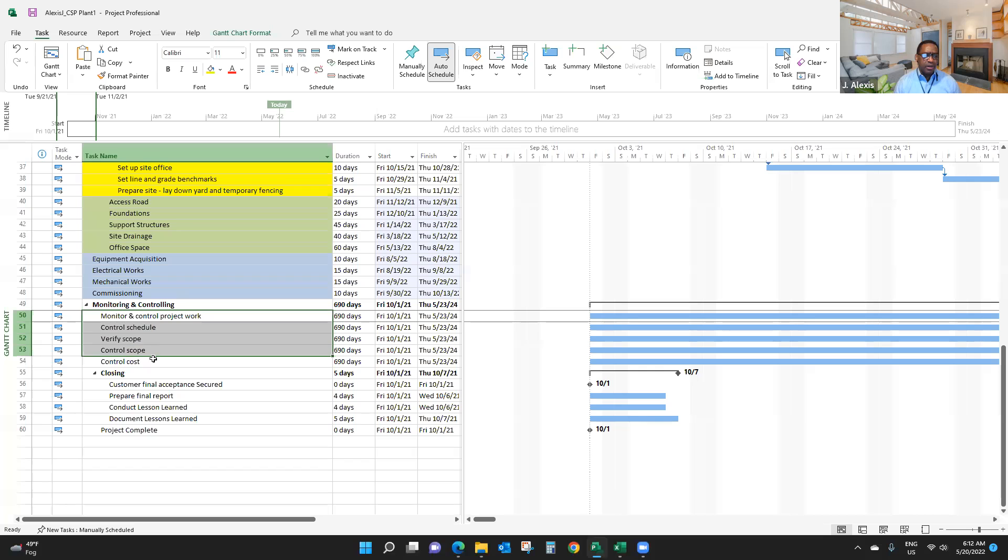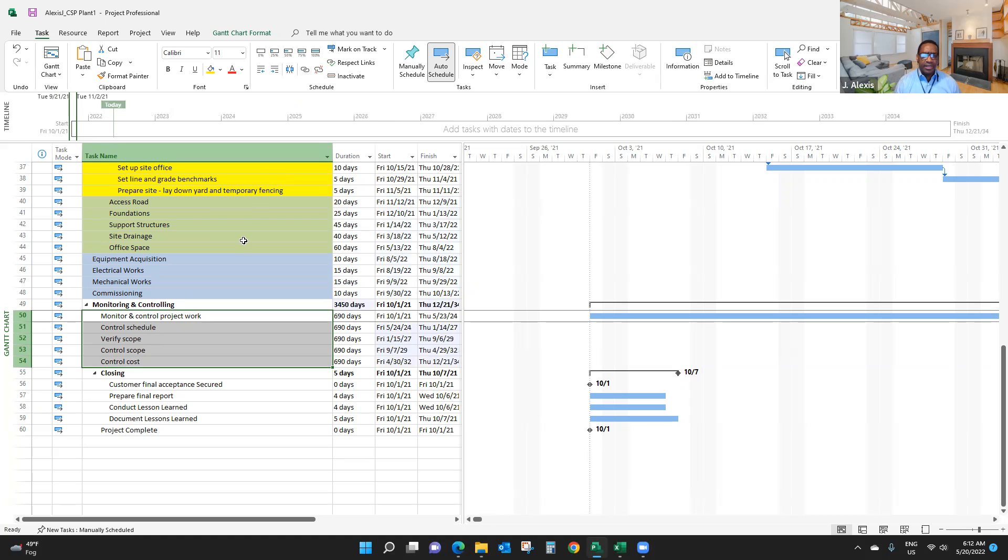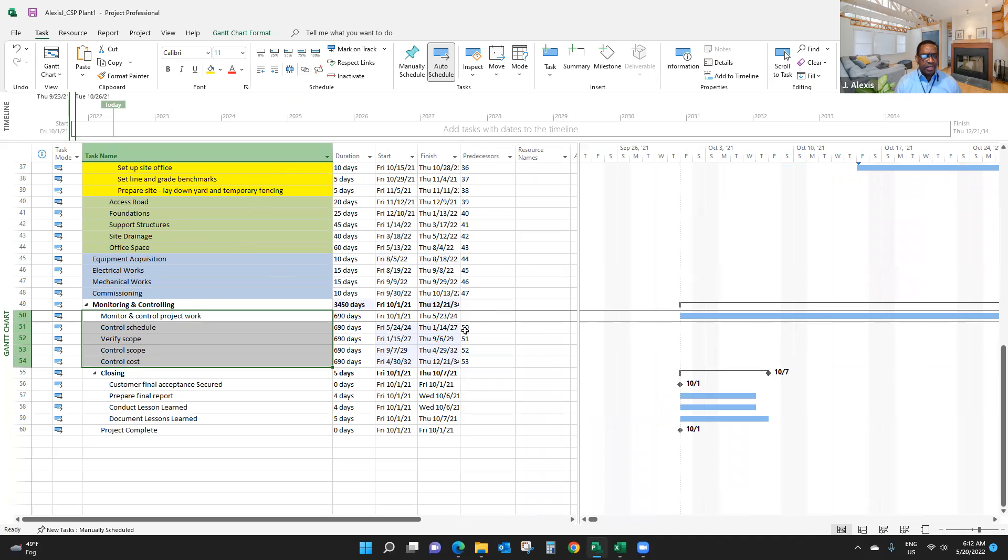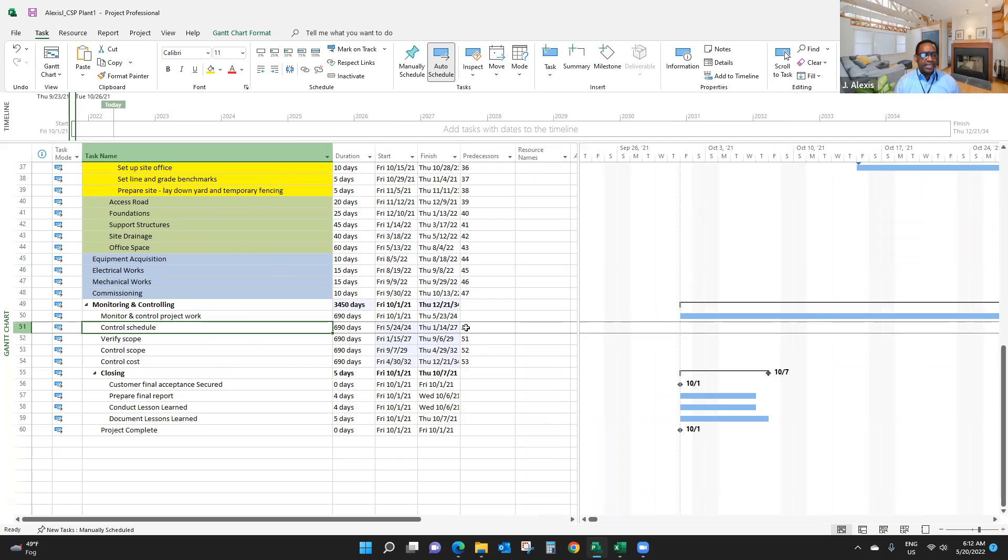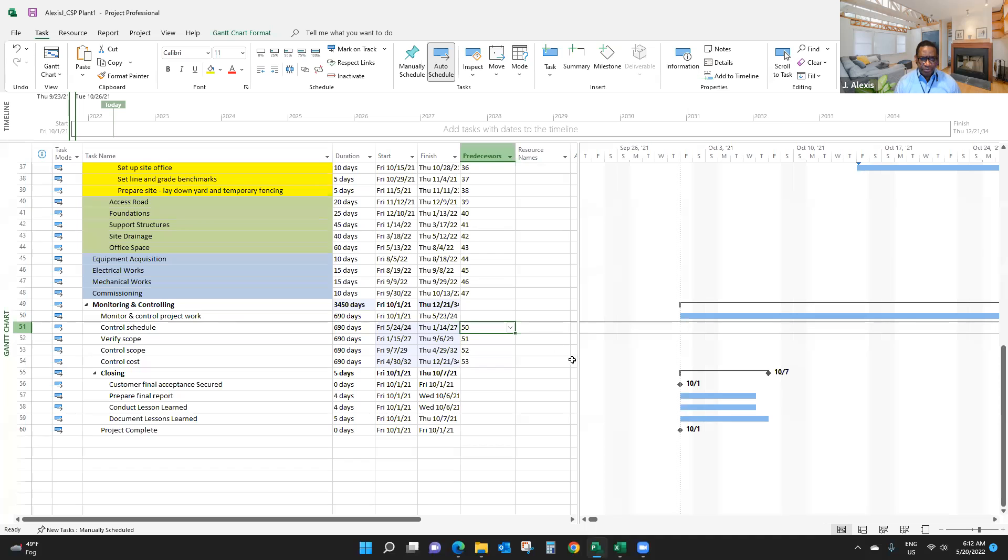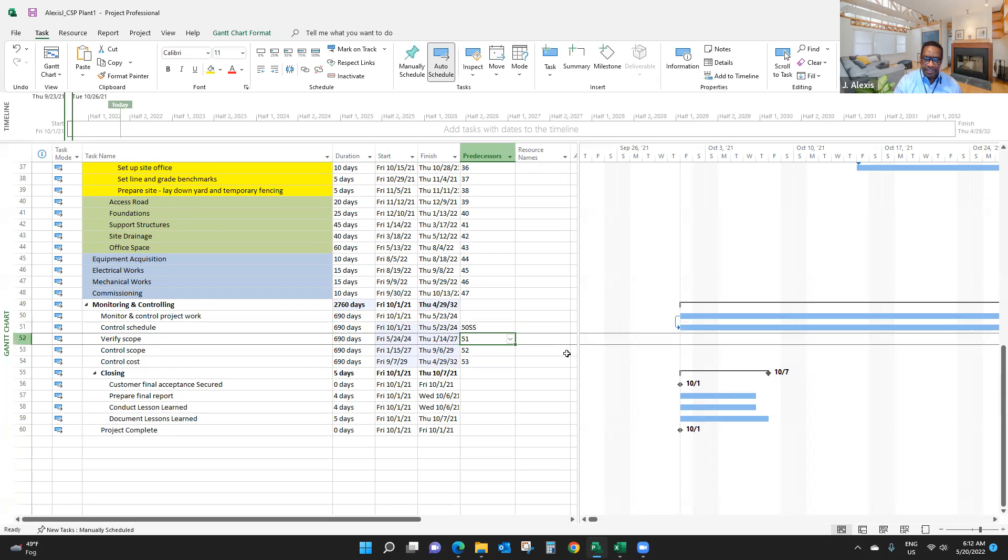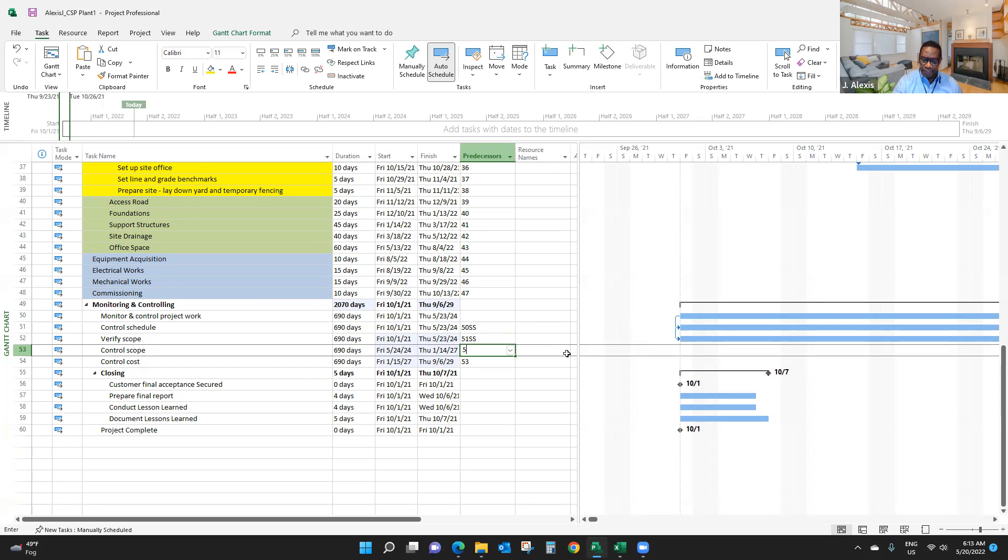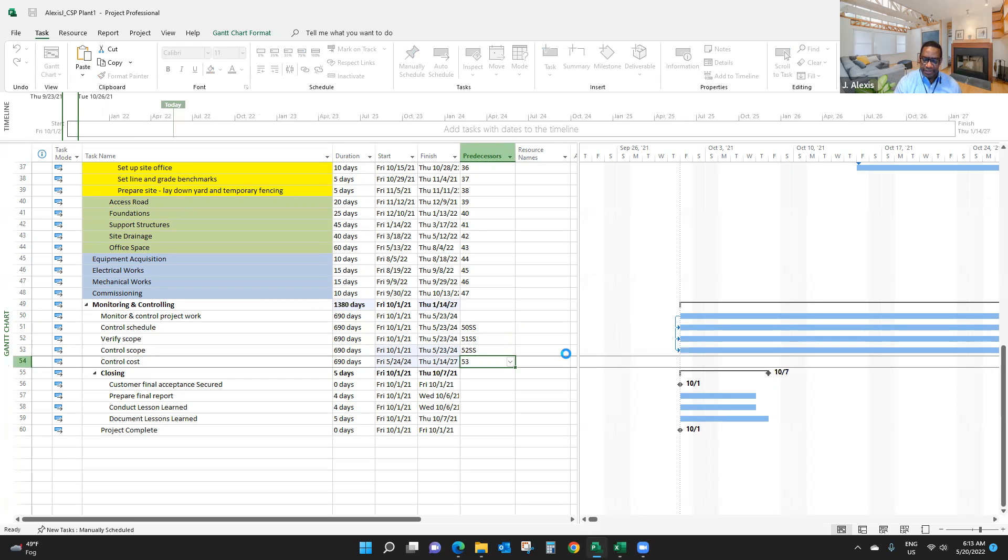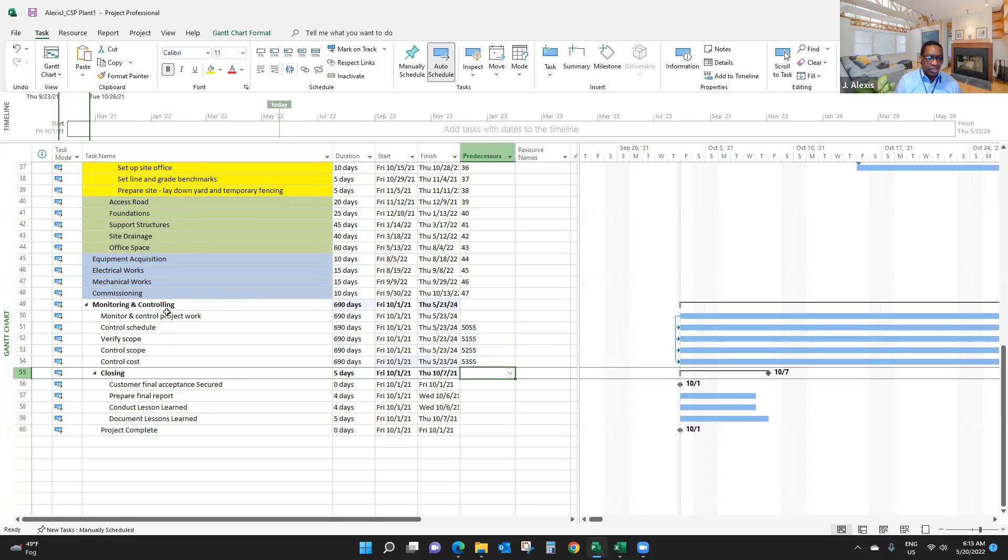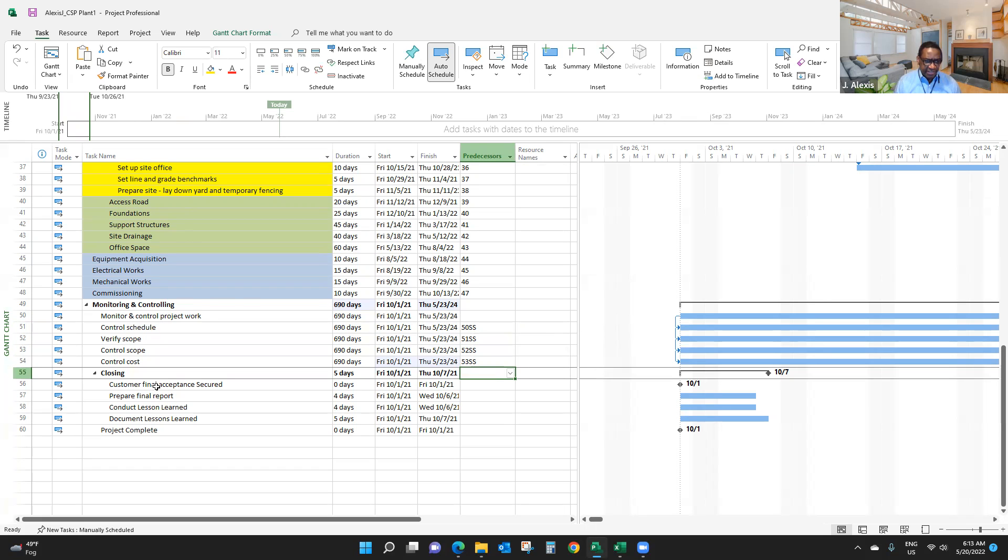Now I'm going to link the monitoring and controlling activities. Let me look for the predecessor to see what's happening here. For monitoring and controlling, I want to plan those activities start-to-start because I'm going to perform those activities at the same time. So 51 has 50 as predecessor. I can do 50 SS, 51 SS, 52 SS, and 53 SS, which means I'm going to start doing monitoring and controlling activities at the same time.